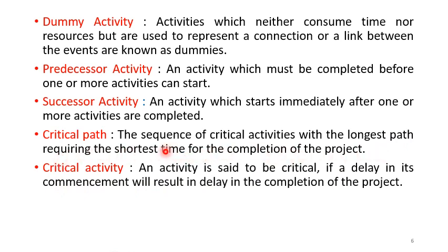Whenever we choose the longest path from the start to the finish of a project, remember that every project has different activities, all drawn in the form of a network diagram. You can trace different paths from the start to the finish, but not all paths will ensure that all activities are completed. The longest amongst these paths will ensure that all activities are completed, and the project is complete only when all activities are completed.